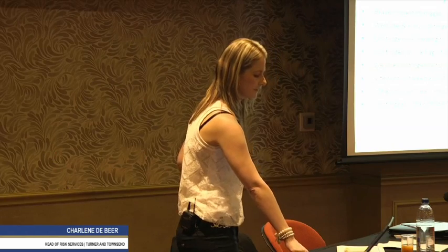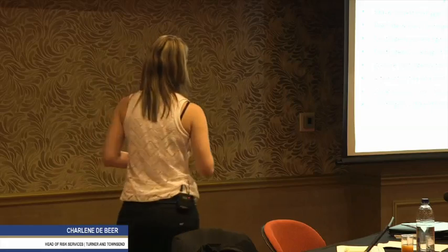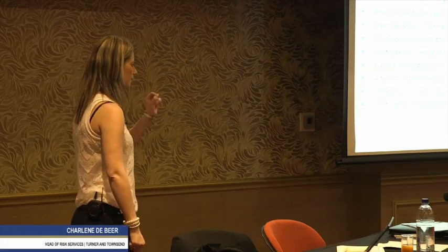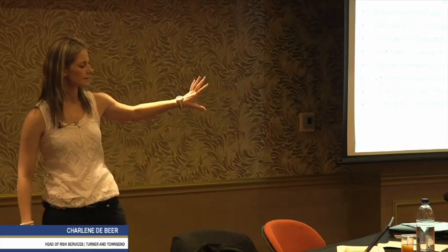Contingency drawdown follows cash flow and not execution schedule. So what it means is if we do a drawdown from contingency, in the risk management plan that you're supposed to have, it should say that you will follow a project controls notice, which will give you the right to do a drawdown. The project controls notice will say, this is in the risk register, it's been identified, I need X amount of contingency to pay for it.